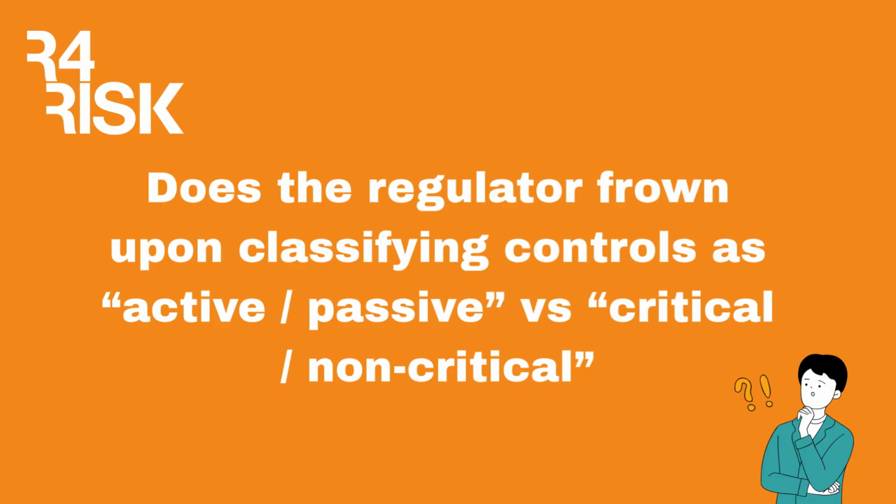Well, no, actually, I wouldn't say that, because the recent CCPS book on bow tie management, and it's only come out in the last couple of years, classifies controls as either an active or passive layer. And I suppose they're more characteristics of the controls. So whether you have